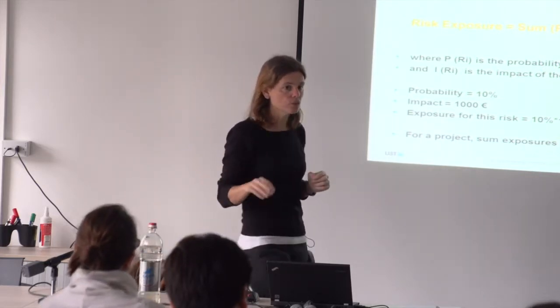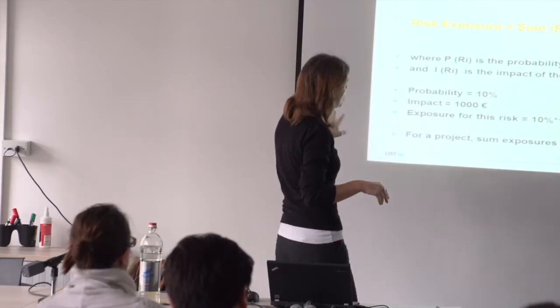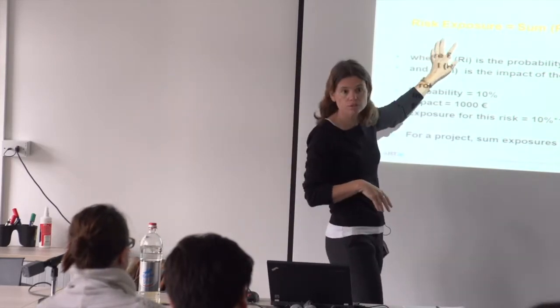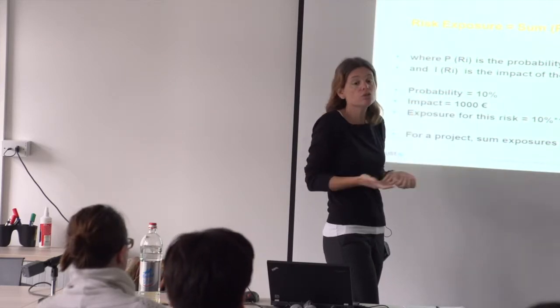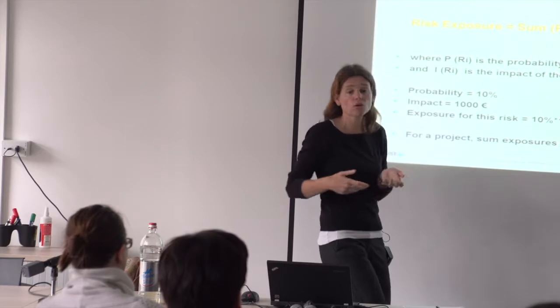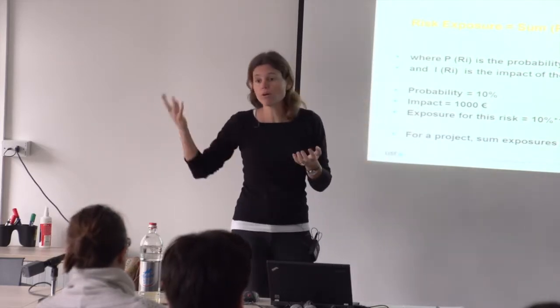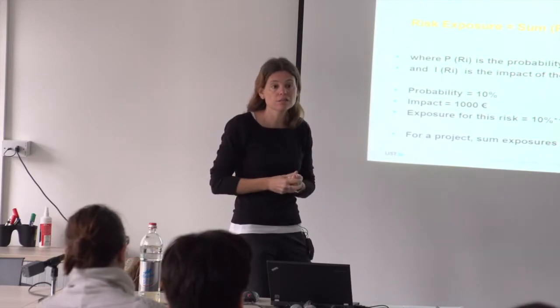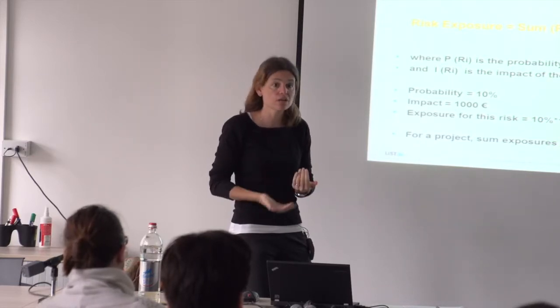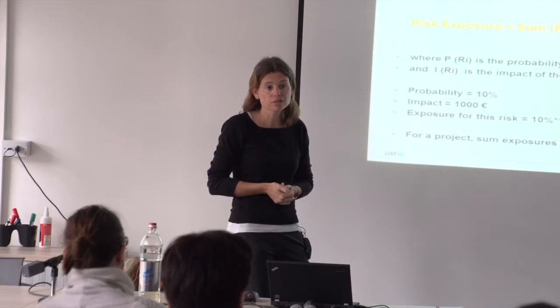And most of the time you are not going to try to assess. I'm not using a risk exposure on my project, because I could invent 10% or 23% or 34% of probability, but it would just be guessing without any actual facts.